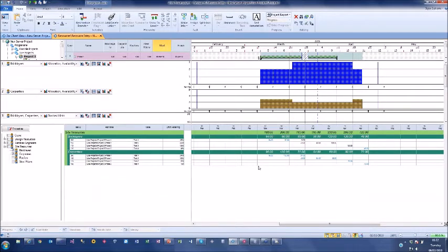And there's a whole range of formatting options you've got with this side of the resource usage view. But the key part as well is that although I've assigned 80 hours, I can actually say in that week they're only doing 50. So I can under-assign or over-assign or change it for a particular week, which affects that particular task and affects the resource usage.